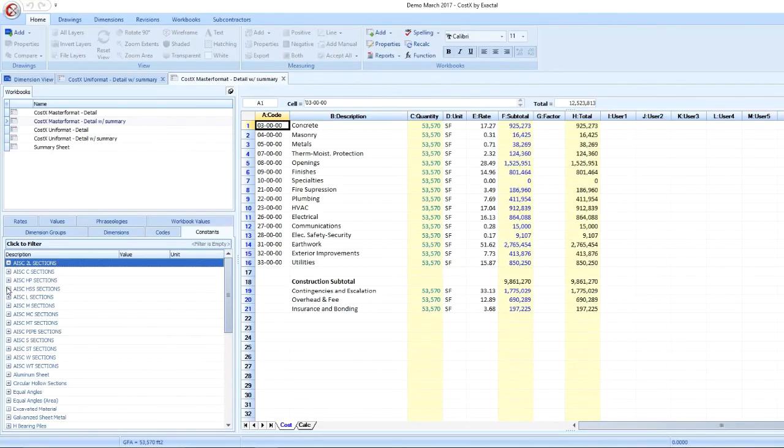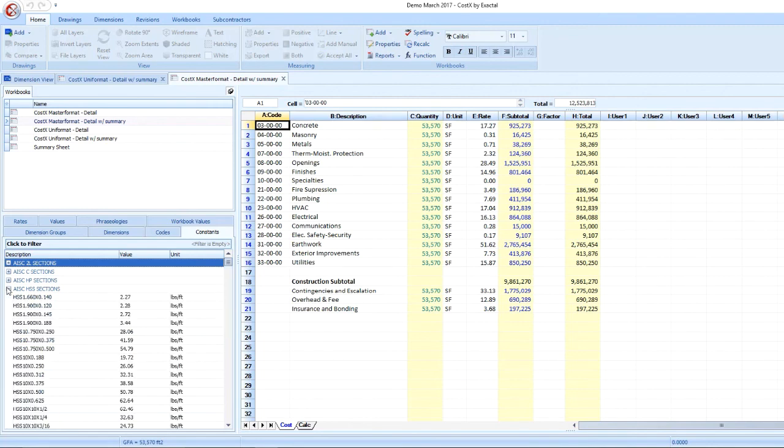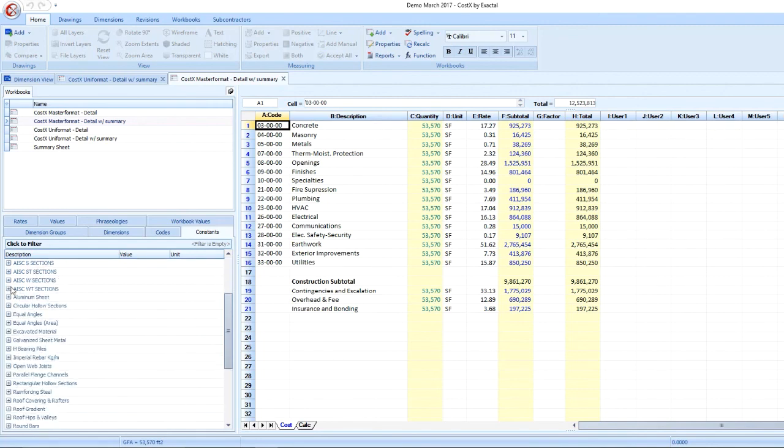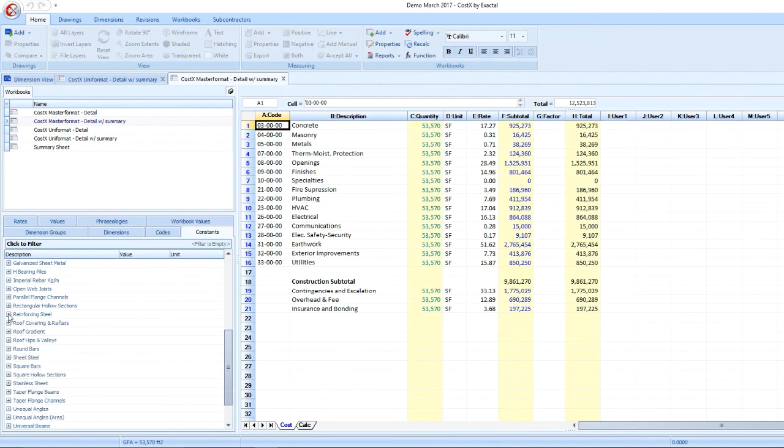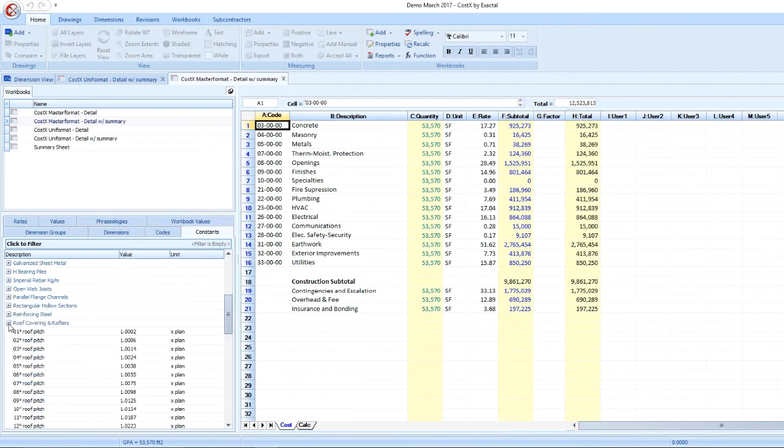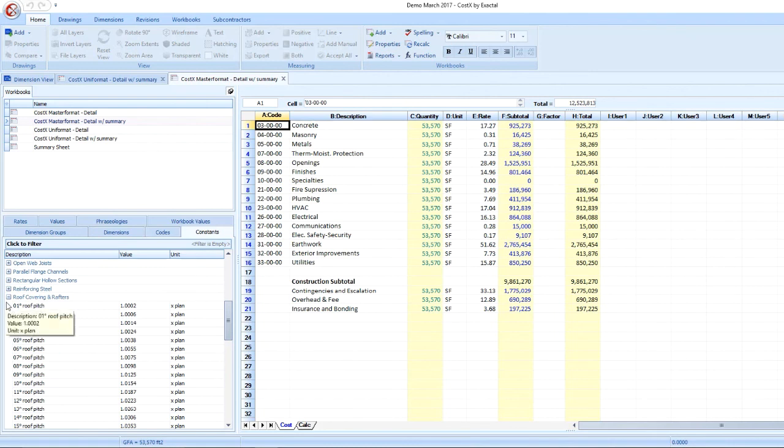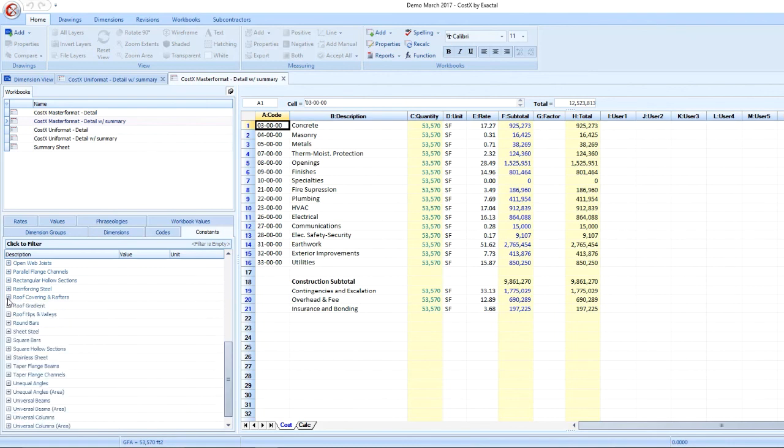Constants can represent any fixed numeric amount that you wish to reference in your workbook. For example, constants may represent fixed factors such as steel or rebar weights and roof pitch factors. They can be used as variables to calculate labor constants, production rates, and more. Constants are live linked, so they will update in the workbook when they are adjusted.